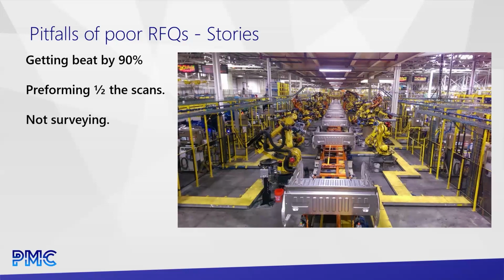So, if you're in the market and you're contracting this work out, the takeaway here is if you see enormous divergence in price, it likely means that the people bidding on the work are misunderstanding your RFQ. They don't know what it is you actually want, and they're bidding on two very different things. So if you see those large divergences in price, it's worth doing a call, checking in with them, making sure they all understand exactly what it is you're looking for. If it's a larger bid, do it in a group setting so that all the bidders understand what you're looking for and that it makes sense to them.